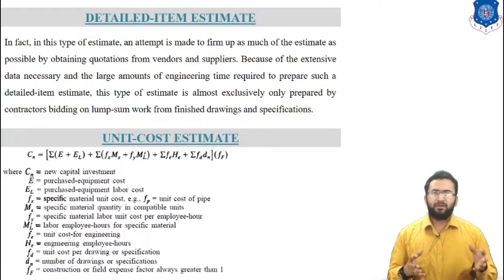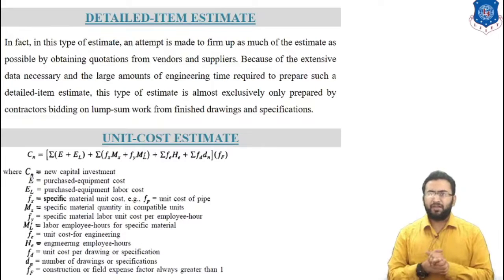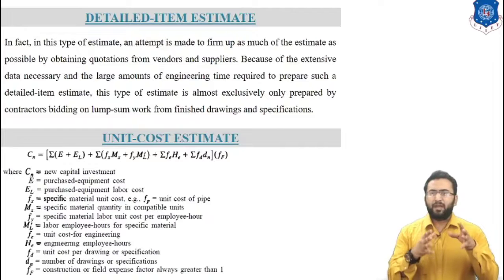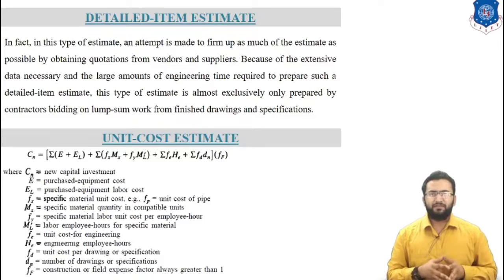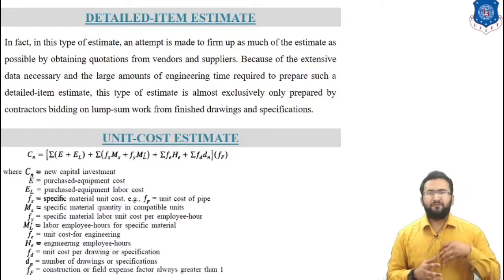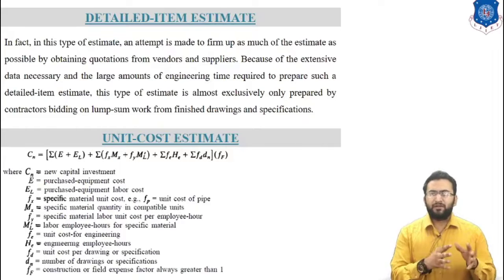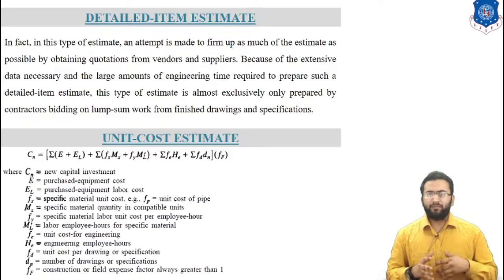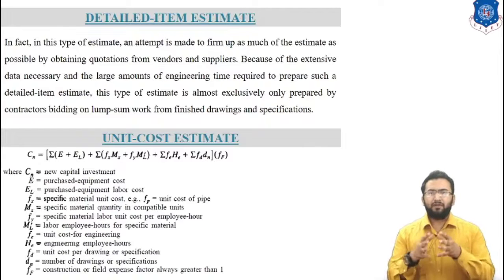The unit cost method results in good estimation accuracy for fixed capital investment, provided accurate records have been kept on previous experience. This method, which is frequently used for preparing definitive and preliminary estimates, also requires detailed estimation of purchase price obtained either from quotation or index correlated cost records and published data. Equipment installation labor is available as a fraction of delivered equipment cost.